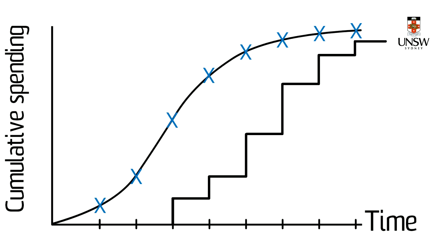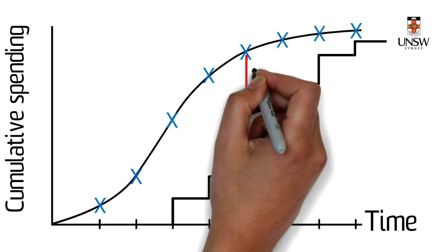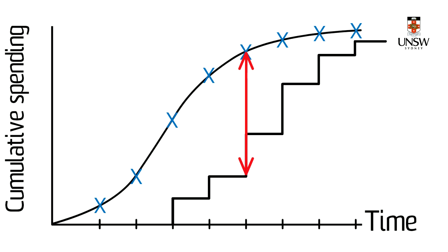Now, the issue for the contractor is this gap between the two lines. What's happened here is that the contractor has paid the top amount of money, but has only received the bottom amount of money. Now, this difference could be a lot of money. The example here is a short project, so the difference is a large percentage of the total project value. In longer projects, the difference will be a smaller percentage of the total project value.